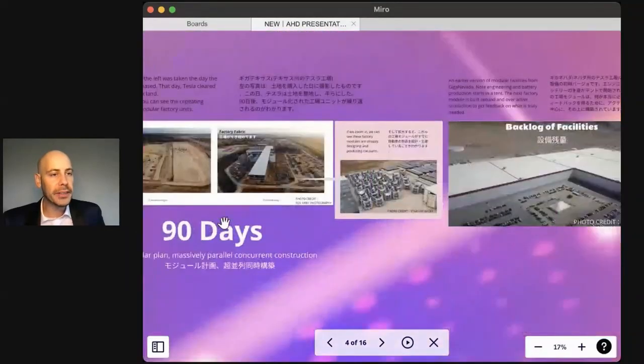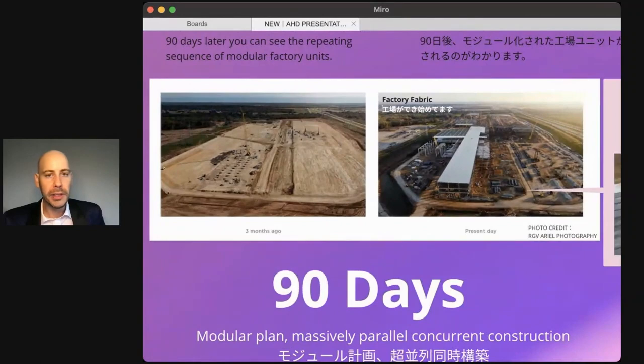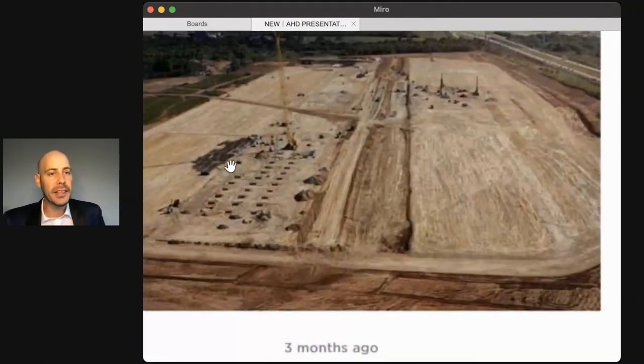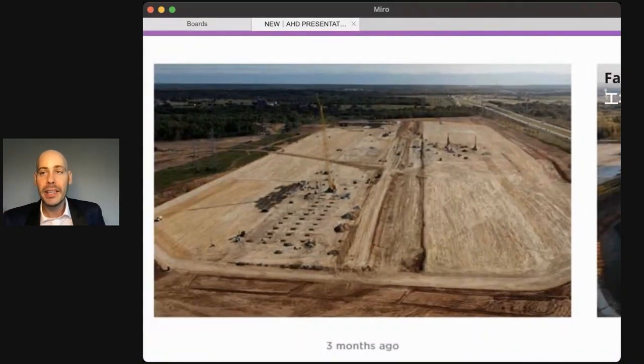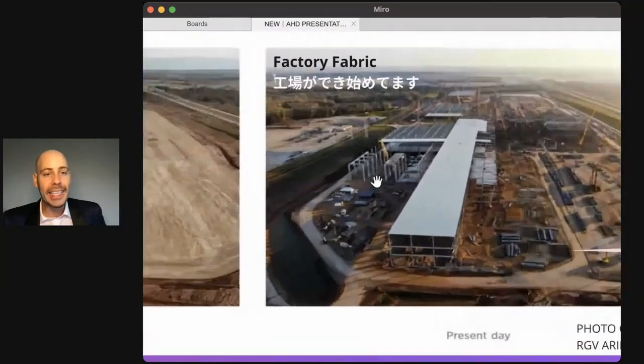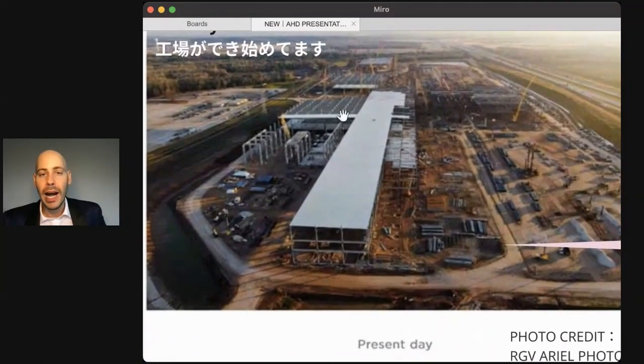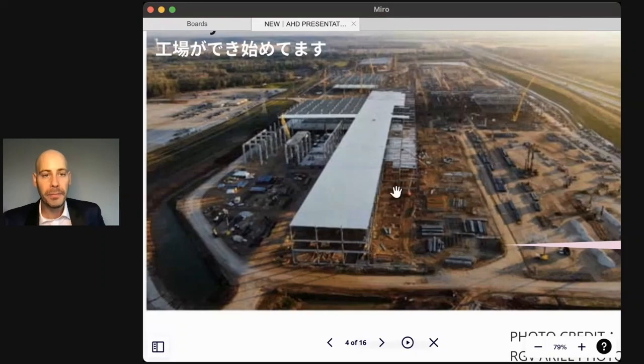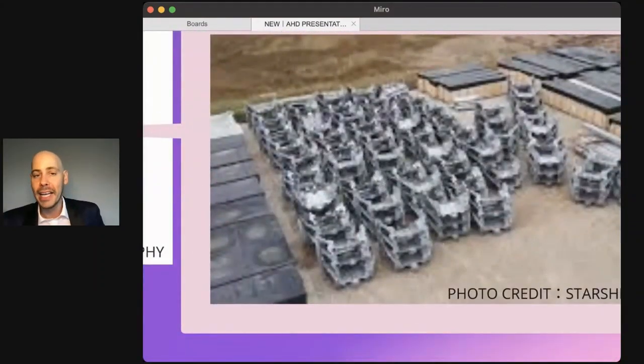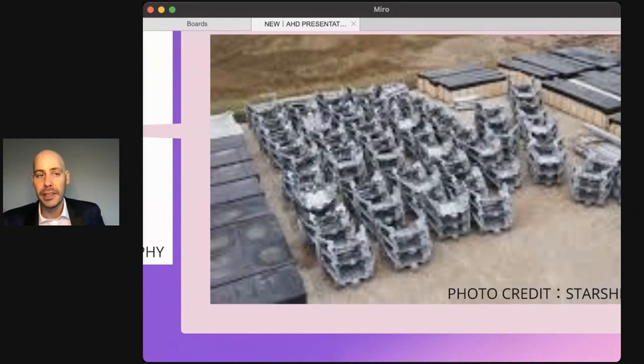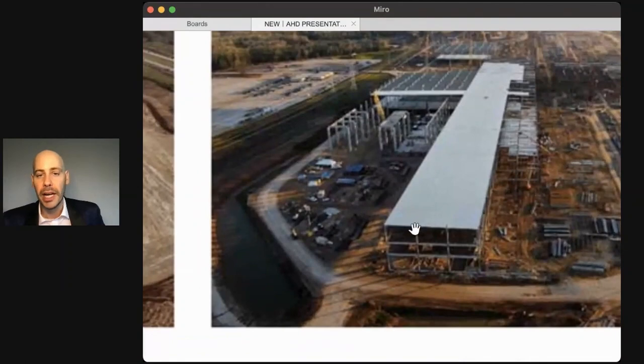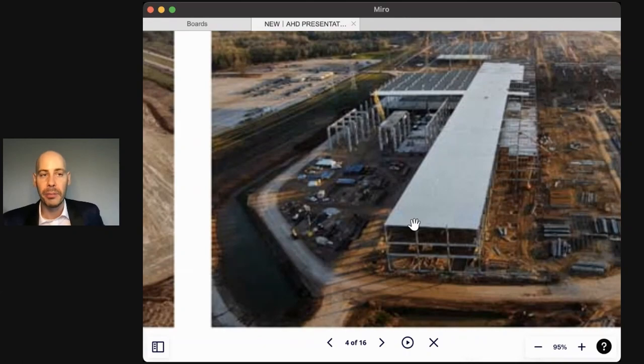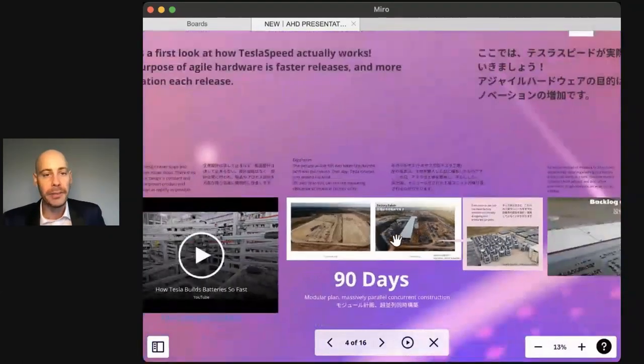In terms of the factory itself, here is Giga Texas, which I attended the opening. Here is the land for Giga Texas the day the land was bought. The day the land was bought, the land was cleared and leveled. Ninety days later, they were operating factory elements. These are modules, repeating factory modules. They're being kitted here. They have their own solar panels on top, their own power, and their own plumbing. If you zoom in, they were already casting cars, already building car parts. They were in production when the factory still didn't have all its walls. As soon as a module is installed, it's in production. So they learn what works, what doesn't, how to improve it. Now this factory is fully done. It's in operation. It's shipping cars now.